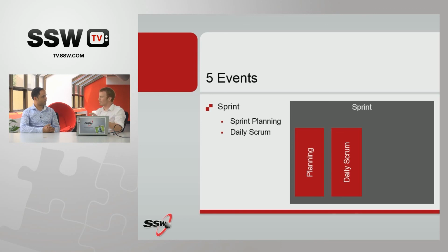They look at what they've done yesterday, they look at what they've got to do, and they all get together and make a plan for the next 24 hours to get them closer. So the pitfall with this is the product owner can attend this meeting, and I've seen this meeting where you have the team